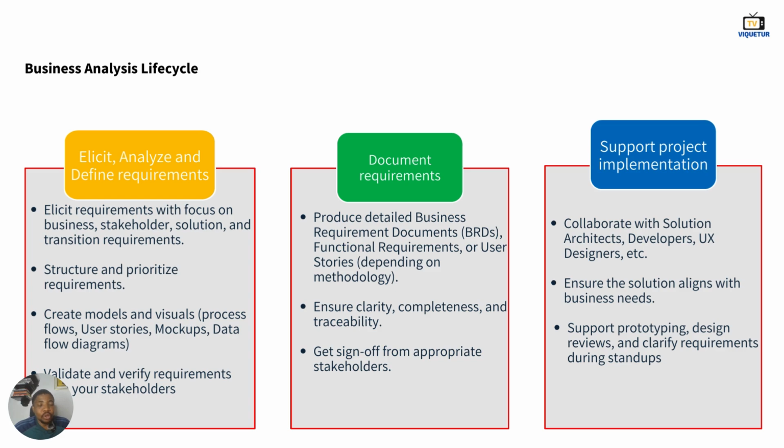on this deep level, on this detailed level, you collaborate with your solution architects to map out how the solution will be, draw Figma screens, you collaborate more with your developers, your UX designers. Basically, you have meetings back and forth with them. Then also, you are ensuring at every point that the solution aligns with your business needs. So once your developers start building, you don't wait till they get to the end before you start doing demos. After they've built any feature, you touch base with your stakeholders to say, we've done this. Is this what you really want? So if there are changes, you're able to fail fast and make those changes faster instead of waiting for it to be done.